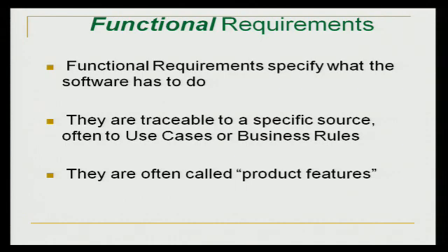It is important that we have traceability, and I'll talk about this later in the class, but things do change a lot, and when things change, if you have a good trace of the artifacts that that requirement produces, it's easier to understand the impact of that change. So traceability is very important. You can do it manually. There's tools available to allow you to do that. Again, we're going to talk all about requirements tools later.